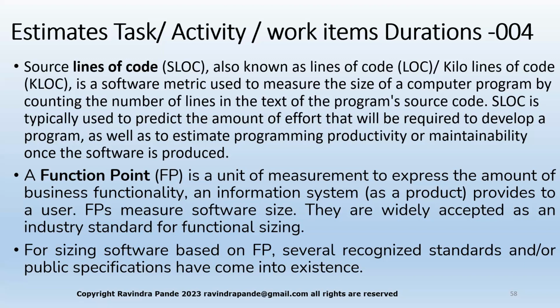So if you are building a solution, if you are developing a program, we normally go with the lines of program, and we'll try to understand that for .NET, it's 182 lines per day. For Java, it's 171 lines per day. So this way, there's an industry standard. Your organizations might do a bit better than that because of the abstraction of the class and so on and so forth. Let's not go into details.